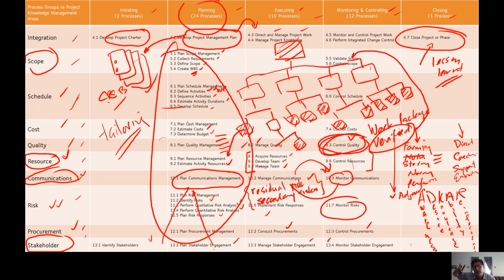I'm not talking about lessons learned. Lessons learned is when the project is finished, so it's too late. We talk about lessons or knowledge. There is a thing we call the lessons learned register that we accumulate. We fill it up from the day we start the project until the day we close. It's only when we come to closing the project that we compile it and archive all the lessons learned into a document created by the project team and project manager.